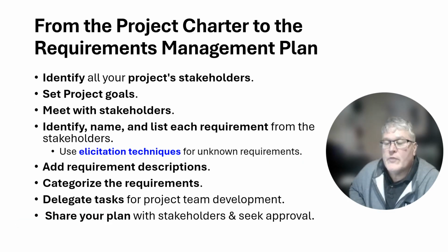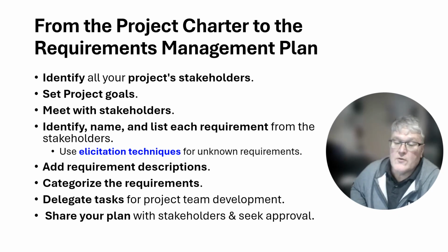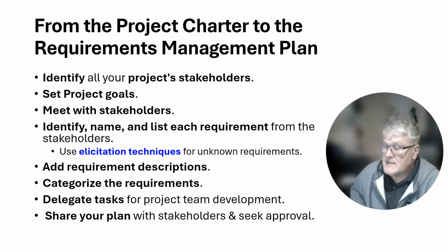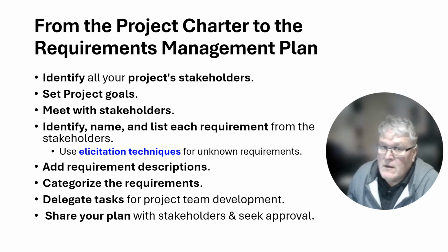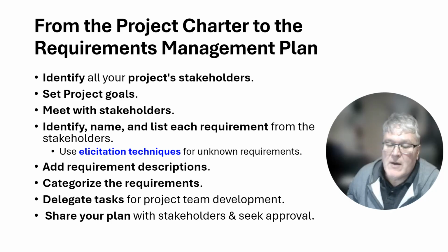So from the project charter to the requirements management plan, you identify the project stakeholders, you set project goals, you meet with stakeholders, you identify, name, and list each requirement from the stakeholders. So you're probably going to interview them and ask them, okay, what really, from your perspective, is important for doing this project and doing it correctly. So you use those elicitation techniques that I talked about before.